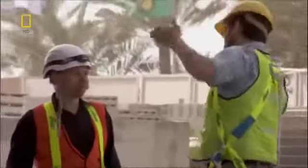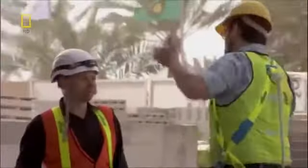The engineers have set 21 kilometers per hour as a cut-off point for lifting the blades. Anything higher is unacceptable. With winds howling at 85 kilometers per hour, all they can do is wait.